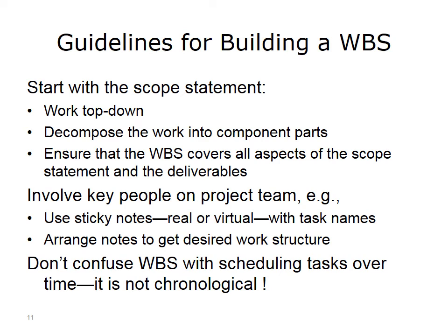This can also be an excellent way to start engaging the people on your project team. You might get them to assist you in rearranging sticky notes, either real or virtual, with task names on them, to start building the WBS structure. With this method, you can get their buy-in while confidently finding the best way to organize the work.